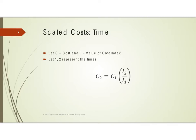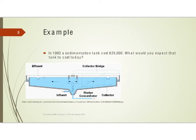The way of using these cost indices is actually very simple — it's simple ratios, no exponents or anything like that. So if you have a cost at time one and you know the index at that time, you can look at the index for today and simply use ratios to come up with the cost for today. Let's look at an example.